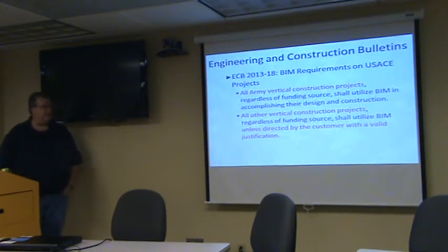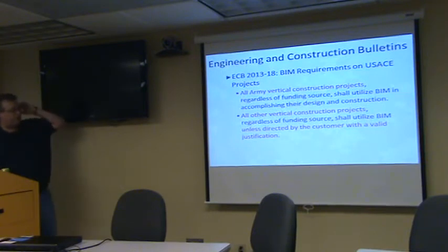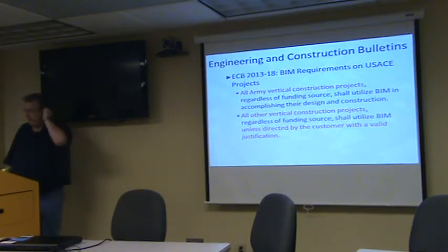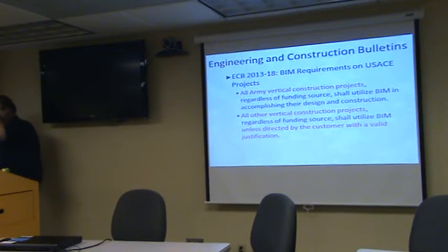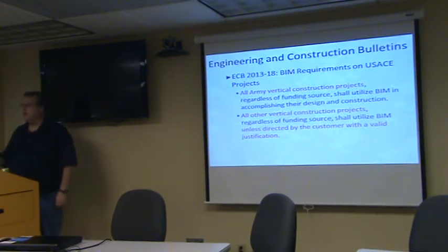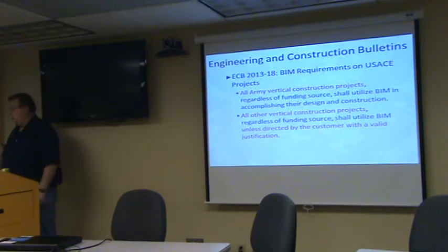I would suggest you just know all Army vertical construction projects, regardless of where they're paid from, will use BIM. So basically what they're saying is no more 2D, period. Now you have to deliver a 2D deliverable, but they want you to use BIM for the betterment of the project. So it doesn't matter how it's funded. If it's funded through the Corps, through the Army, through INSOC, through Congress, wherever it's funded through, you will do some form of BIM.